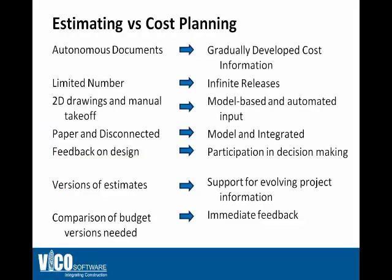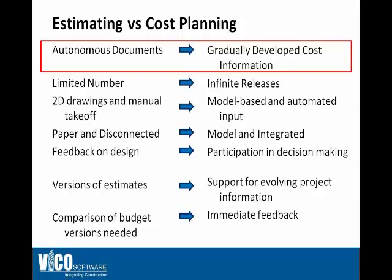We call the cost calculation module Vico Office Cost Planner because it really enables a different process — we call it 5D cost planning. The 2D estimates are typically created as autonomous documents where one estimate is created per phase, and there's no real connection between versions, making cost variance between two versions a difficult process to identify. With 5D cost planning, the cost plan is developed gradually, and you replace line items one by one, maintaining the previous assumption or allocation and providing immediate feedback.